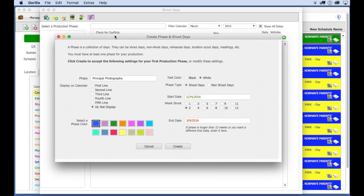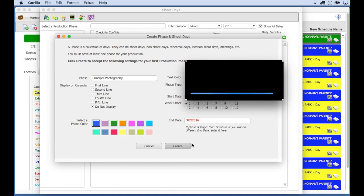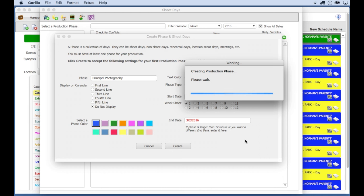On this screen, I'm going to set up a phase called Principal Photography. And a phase is just a collection of shoot days. Let's set it up for one week, since this is a shorter project, and click Create.